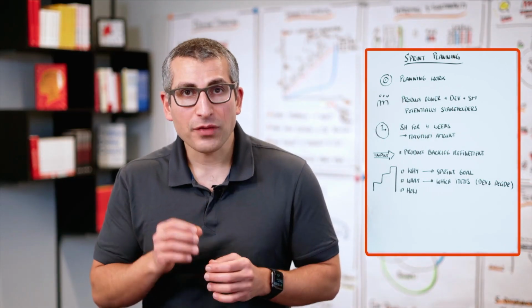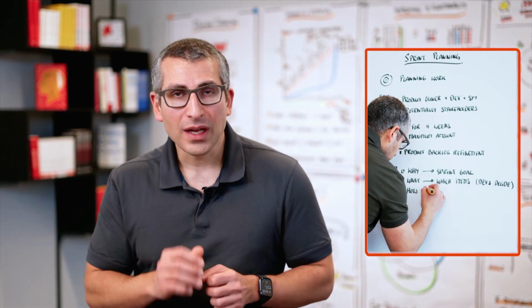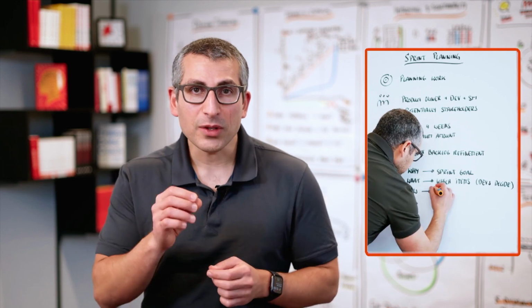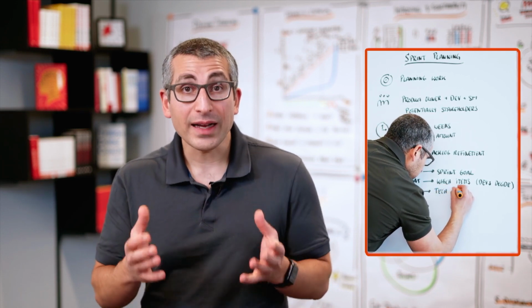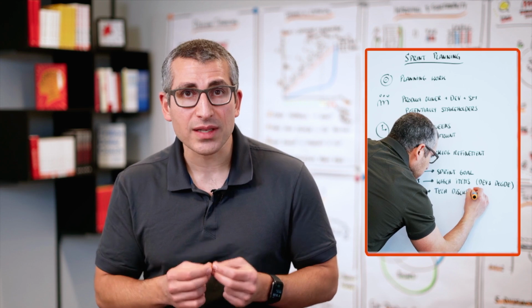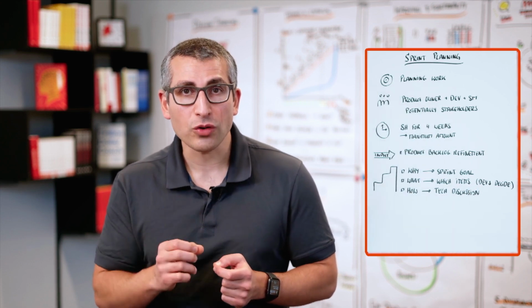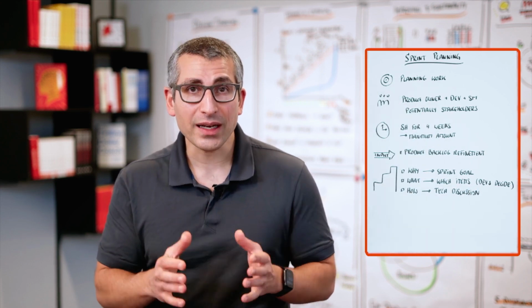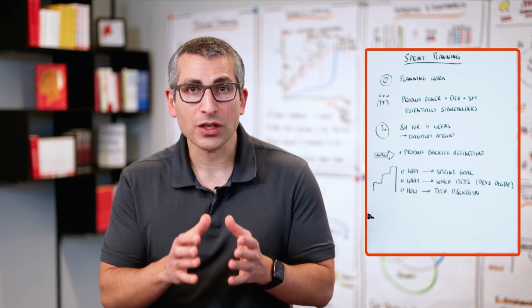The last step of the sprint planning is the how. This is the technical discussion between the developers where they identify and create a shared understanding on how they want to approach the work that they have selected to deliver in this particular sprint.